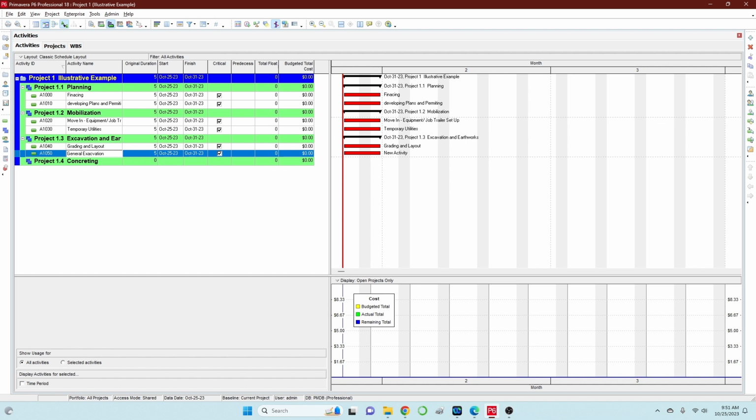All right, so make sure that when you add a specific task, you add it into the specific WBS. The good thing is that Primavera P6 Professional allows us to group them and add those activities to a specific summary task, or in the case of Primavera, the WBS. Then the next thing you have to do now is to add the duration to each of those activities.